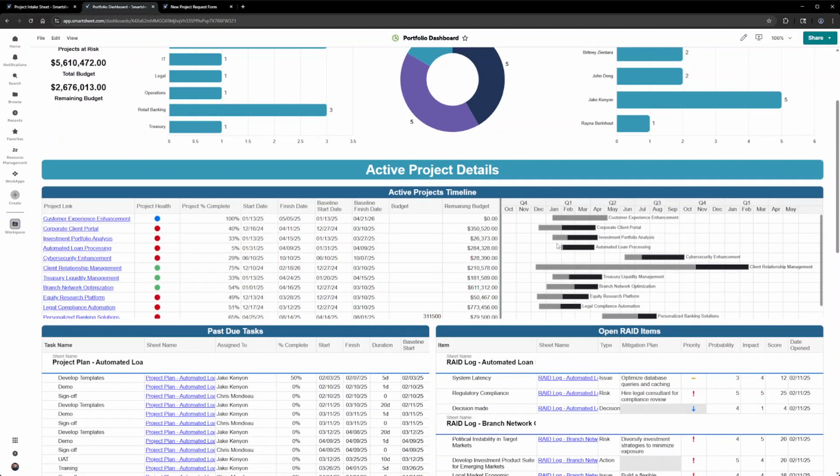You can even see the percent complete within each of these items, represented by this gray bar versus the black, right? That is the actual project percent complete in them. You can kind of see where it's supposed to be at versus where you're actually at based on which month in the quarter you're at.